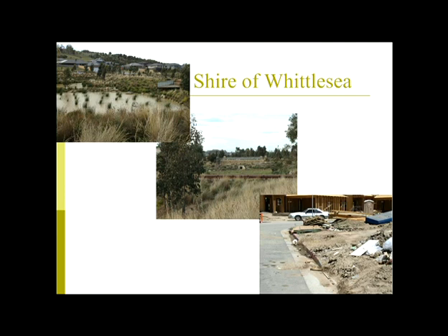But the building continues on. And very often the control of the building sites is not as good as it should be in terms of runoff of construction materials, so sediment and also rubbish. But sediment, as you can imagine, is particularly bad for the wetlands because it fills them in.